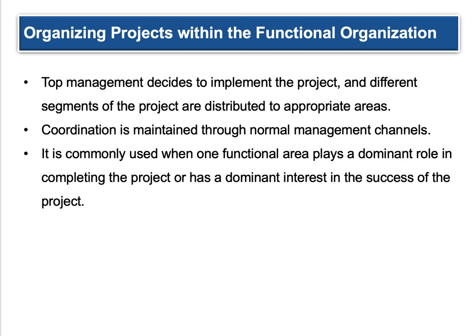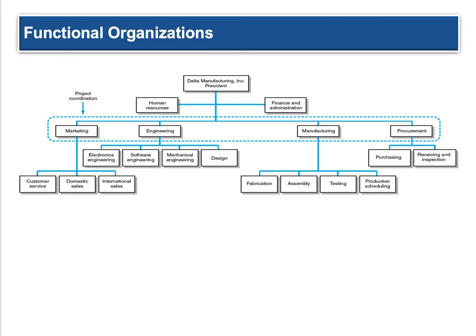In a functional organization, top management decides to implement a project and different segments of the project are then distributed to the appropriate existing areas. So nothing new is created — it's just that the responsibilities of the project are spread across the organization. Coordination is maintained through normal management channels. People still report to their superiors; they just have additional job responsibilities. It's commonly used when one functional area plays a dominant role in completing a project or has a dominant interest in the success of a project — for example, if engineering is designing a new product, they're kind of the lead on it.